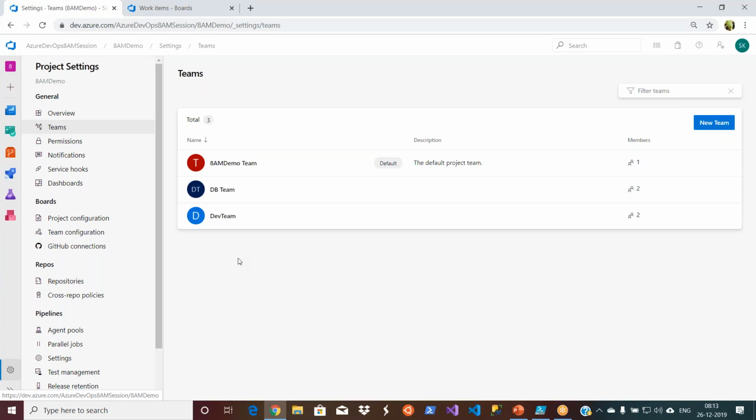You basically have some business analyst, a couple of developers and an architect. That means you have one dev team with few people, and slowly your testers will be added. In a few companies, if testing should start from day one, they will start from the first sprint. In a few companies, they may start from sprint two. So you have that ability in real time.